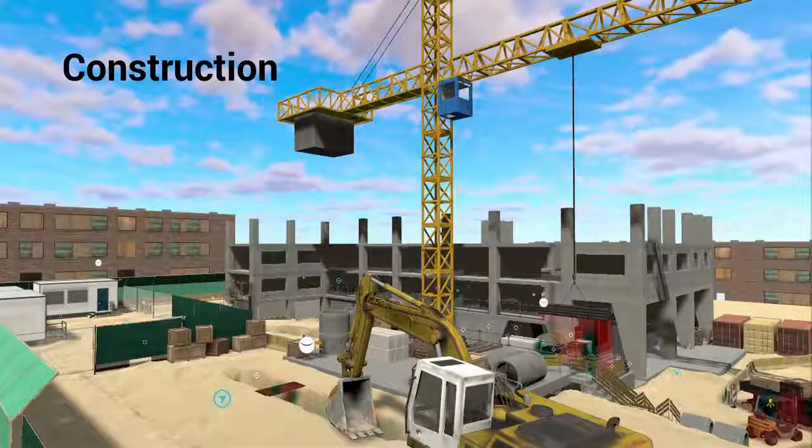And then we get to the important construction phase. Before construction starts, contractors need to tender for the work. Making available immersive models for them to explore while putting their proposals together will help de-risk things for the contractors, as they can get clearer insight into the intricacies of a project. This would lead to more confidence on contractors' part, and our hope is that with less risk, the prices come down, saving our clients money.